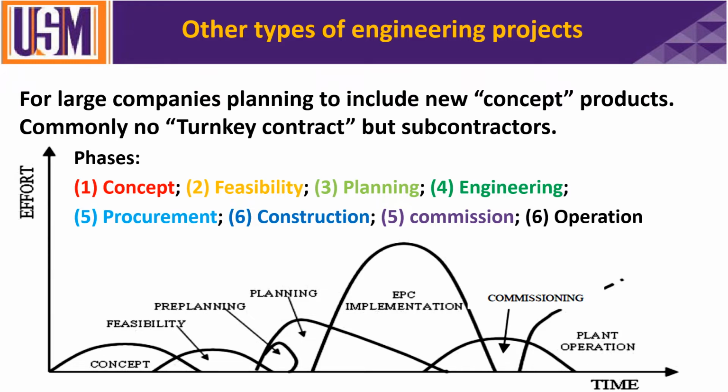EPC here does not include the commissioning. So it is engineering, procurement, and construction. Then you have the commissioning, overlapping also with the planning phase. So commissioning in this case will be the initial testing only, not the operation, lifelong operation, and after-sale services.